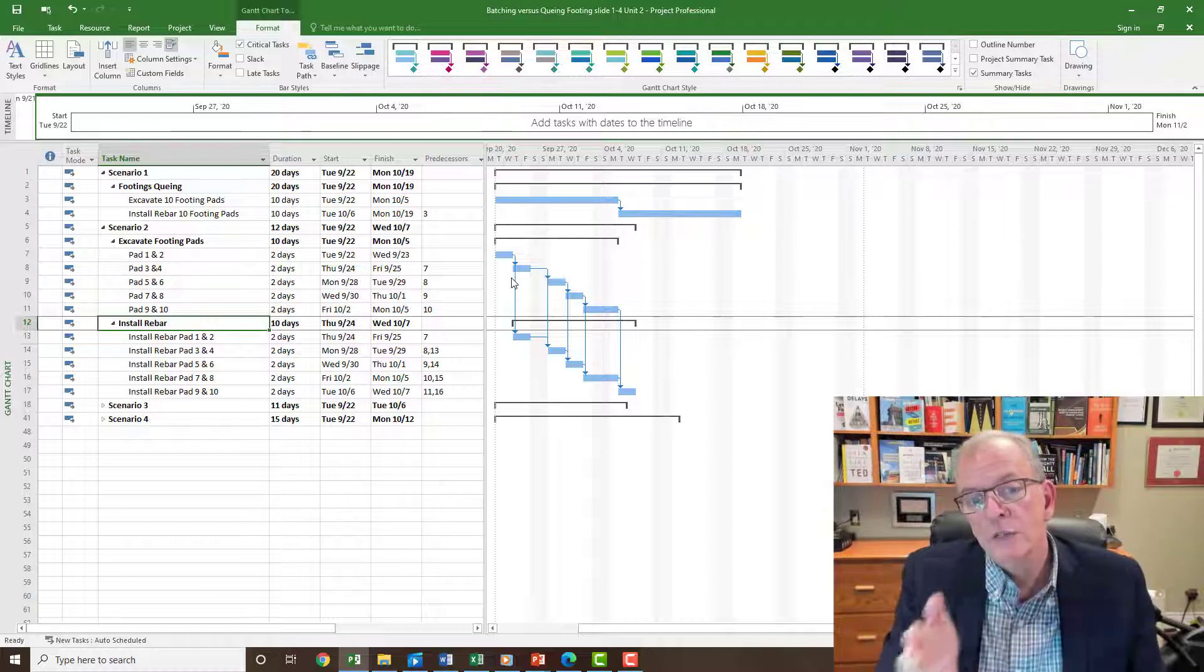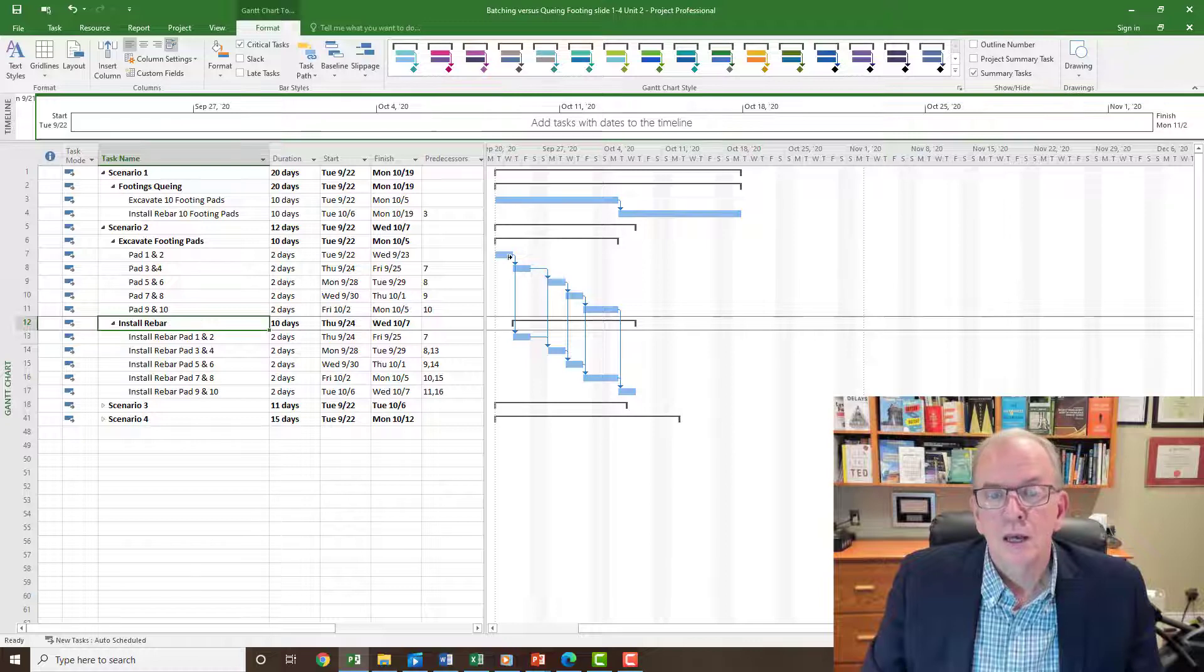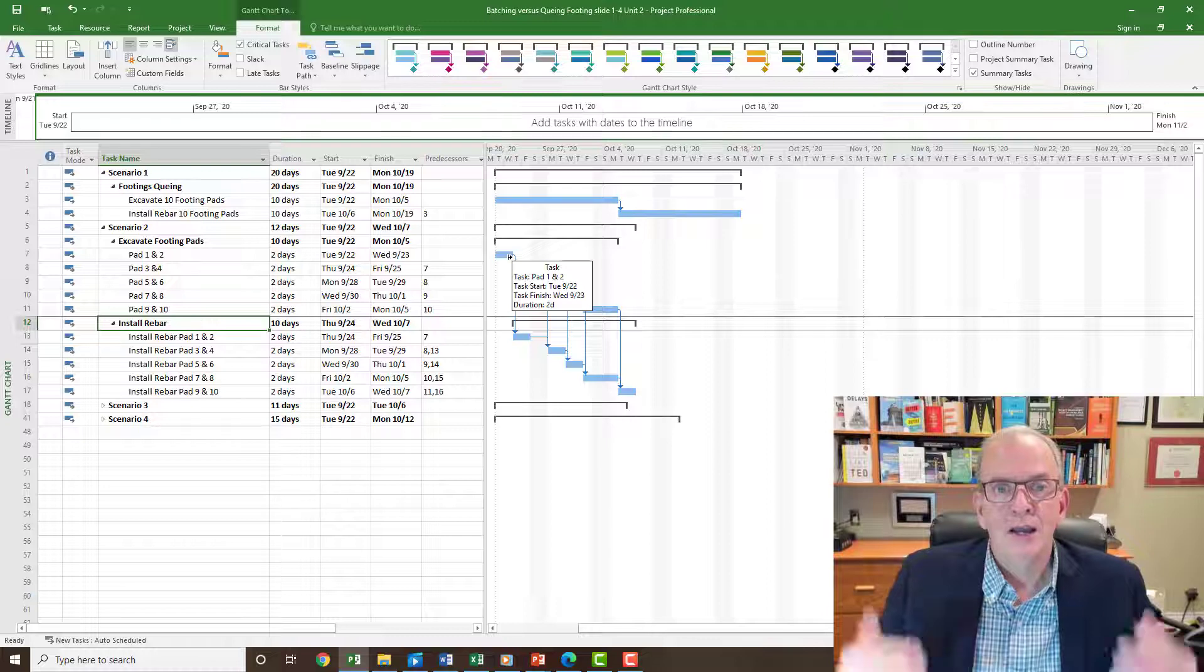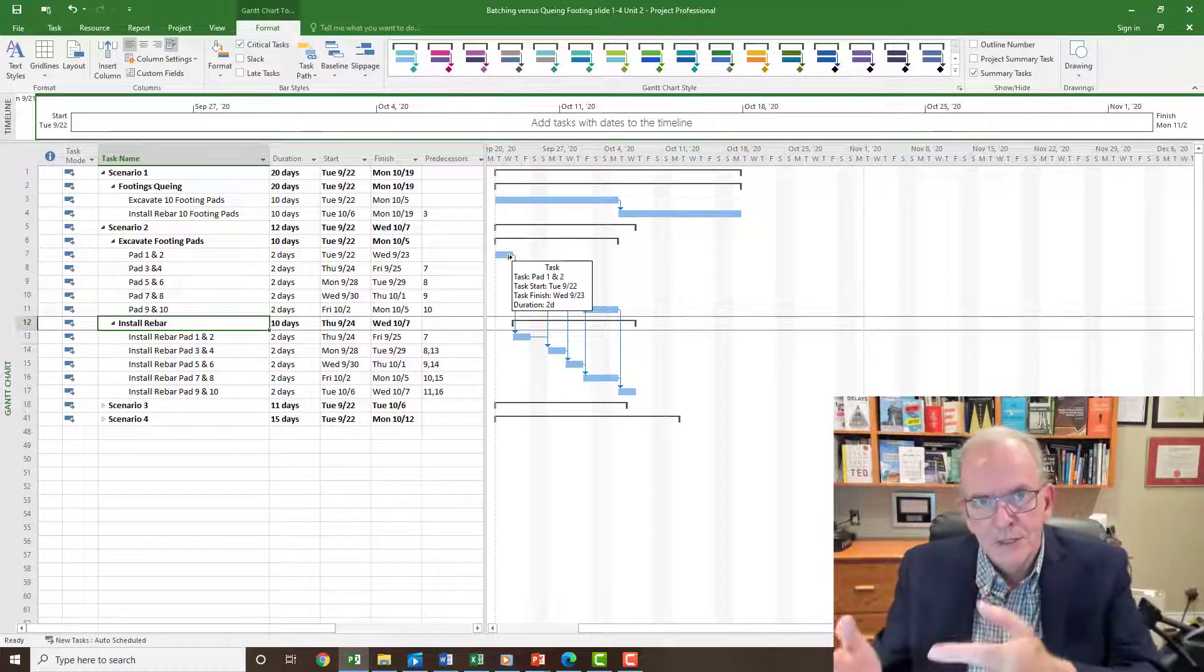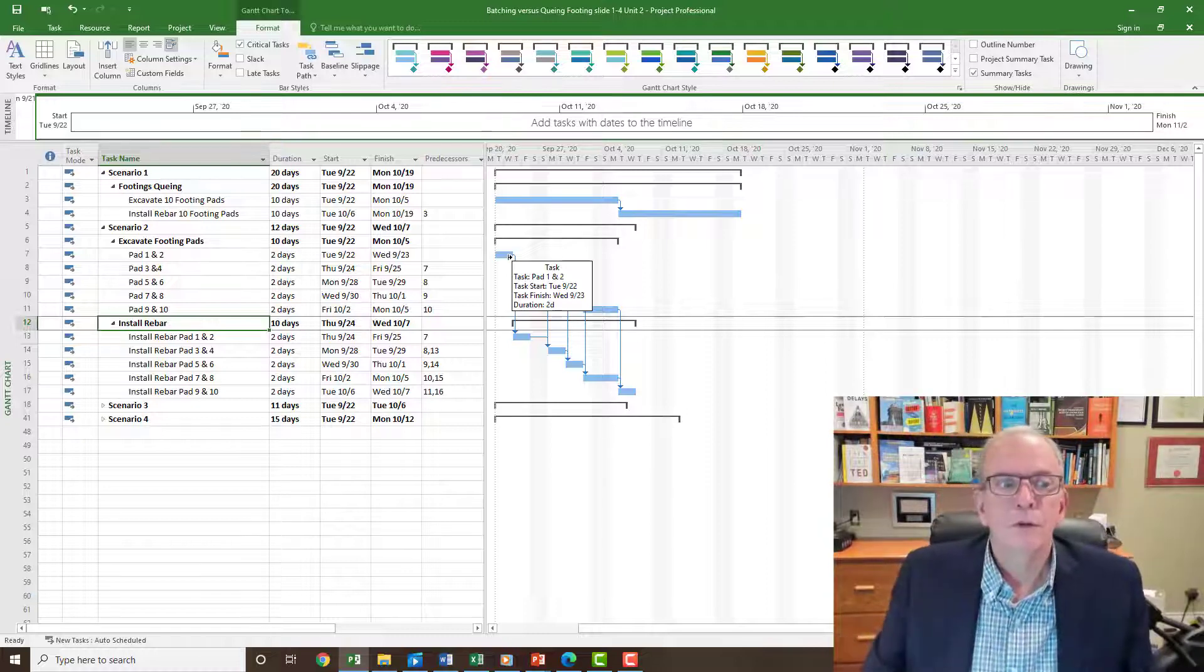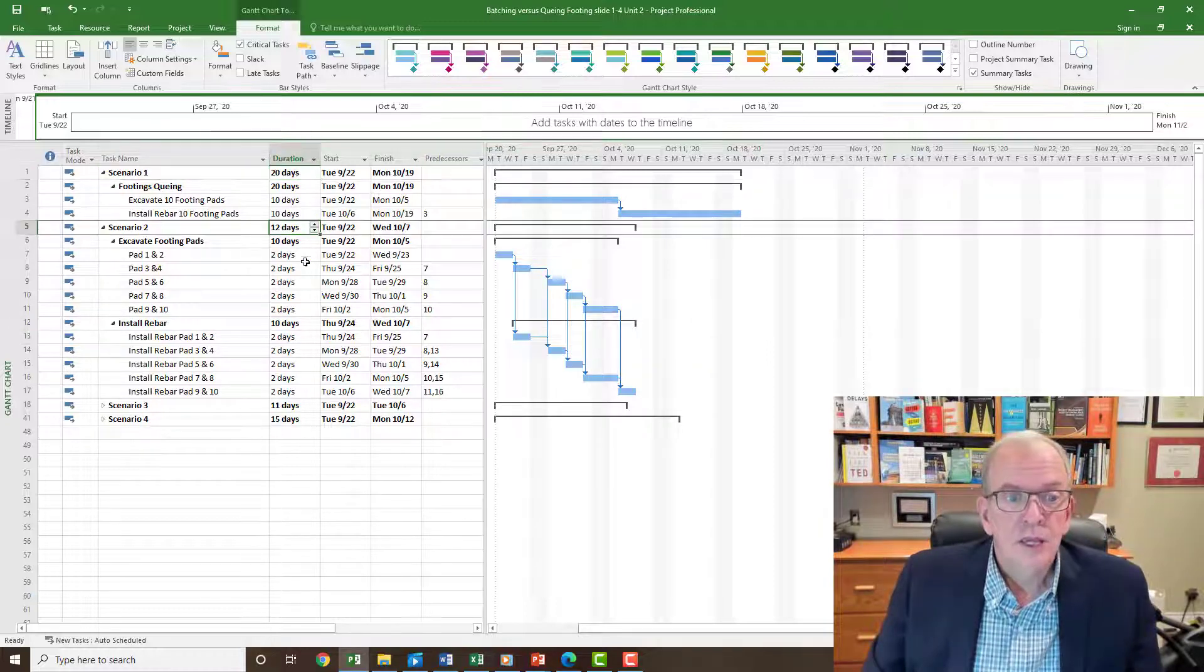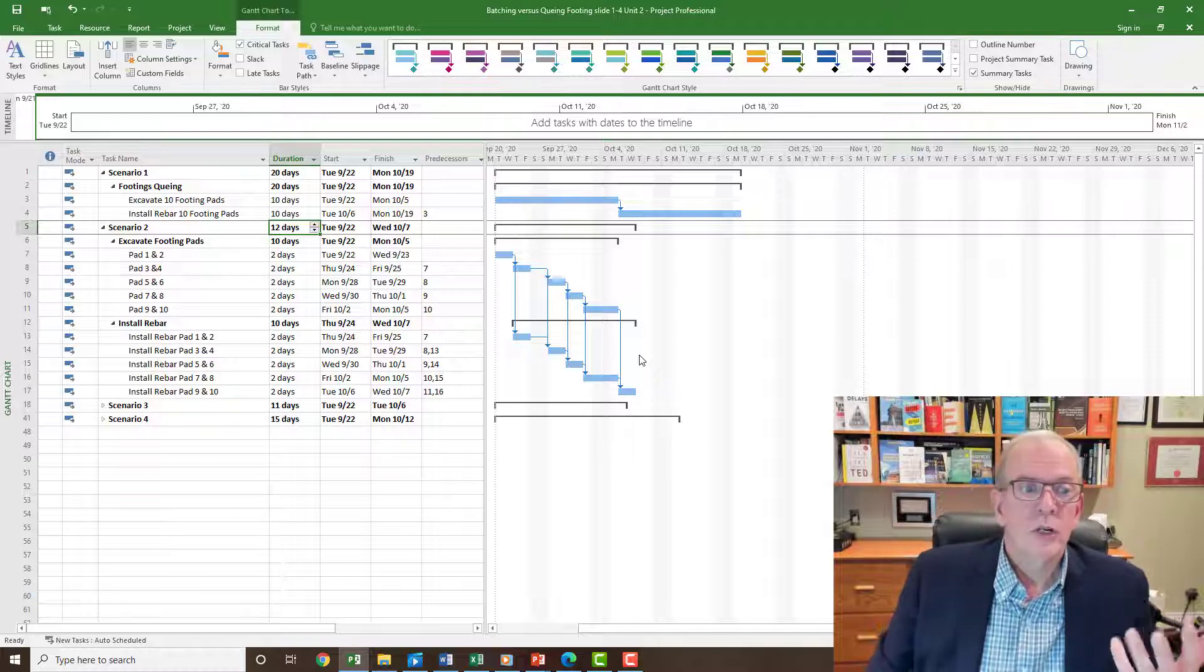And then it starts a waterfall or continuous flow effect on the project. It's really a linear flow to the project. It's really got what they call a tact time - tact time is like a rhythm to it. You know, you finish this, that happens, this continues, it's got a nice rhythm, even velocity flowing with it. So instead of it now taking us 20 days, it's now taking us 12 days. Look at the time saving comparing this to this - huge.